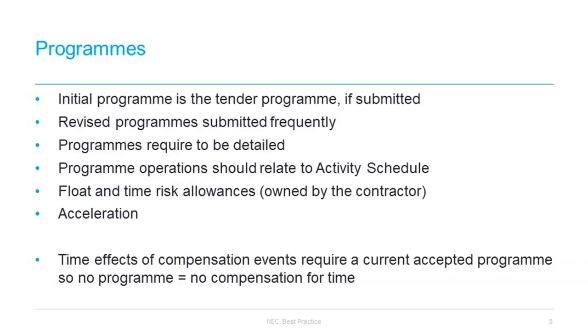The start date in the contract triggers a lot of obligations and liabilities under the contract, and it commences with the obligation to submit revised programmes at the intervals stated in the contract data. The programme to be followed is the agreed tender programme, if that's been submitted, and then after that there should be revised programmes that are submitted throughout the contract if that is required. Revised programmes should be submitted within the period for reply as set out in the contract, and these can either be after being instructed to submit a revised programme, when the contractor chooses, and in any case it should not be at a longer interval than has been stated in the contract data.